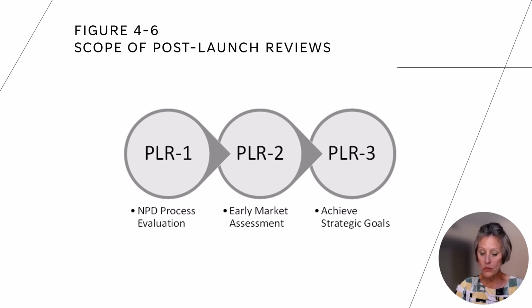These evaluations include whether the product can be manufactured in volumes necessary to supply the market, whether distribution channels can deliver the product in the necessary form and packaging to the correct market segments, and whether after-sales staff are prepared to handle warranty, parts, and service requests. Brand reputation may be on the line for the decision, especially if a next generation product is launched to address previous quality or competitive issues.